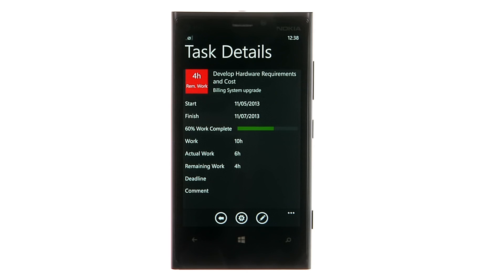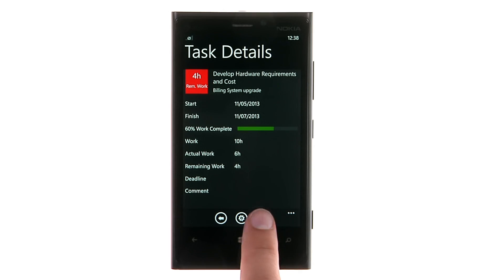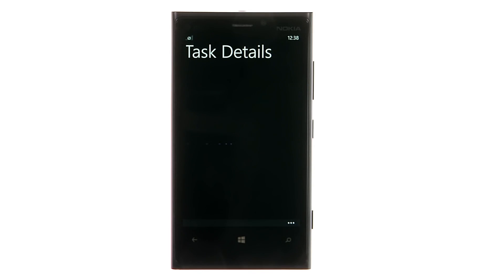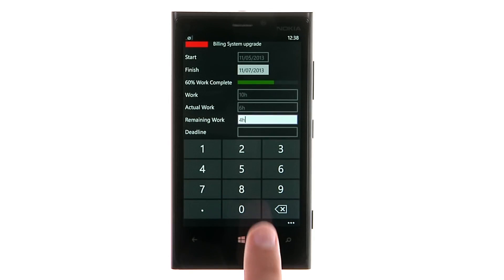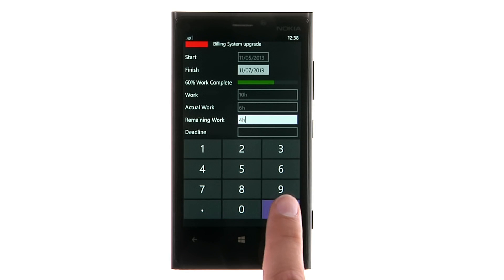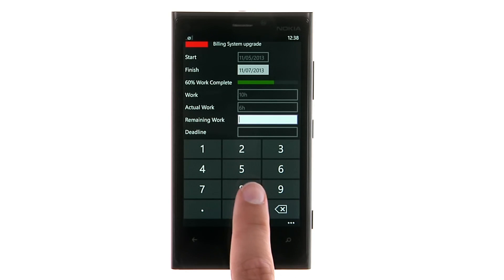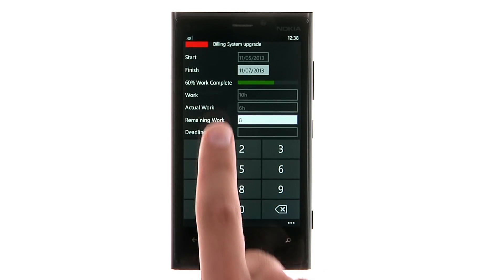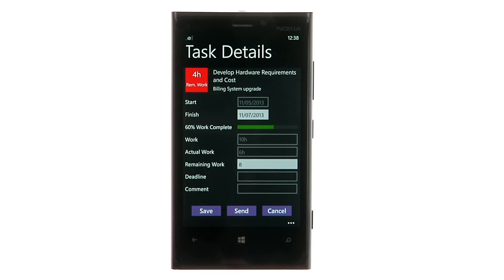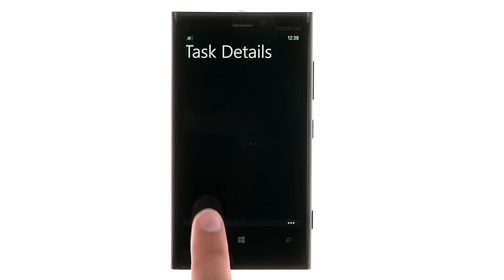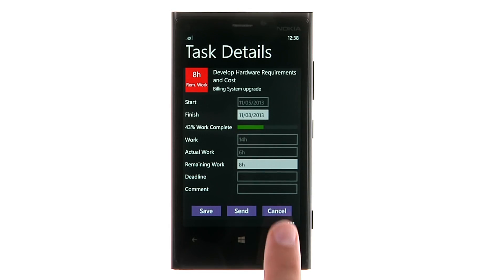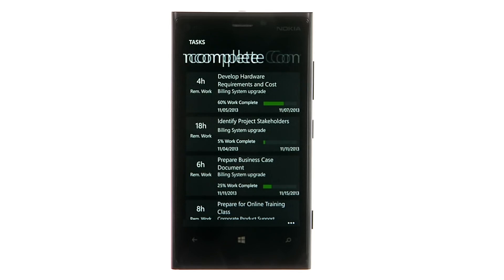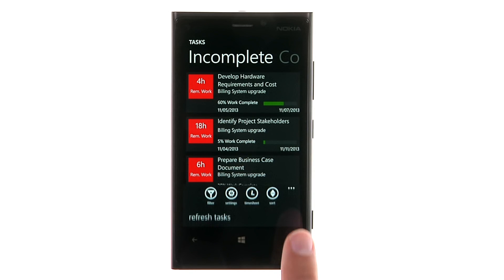To update a task, tap on the task tile and select Edit. Then enter the start and finish date or actual work and remaining work on this task as appropriate. You can either save the information back to Project Server or send the task update to your Project Manager.